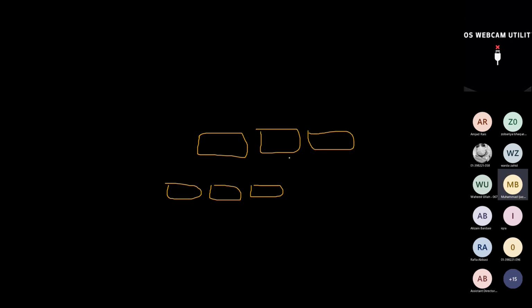Okay, so now multiple user stories combined together give us a feature, right? And then multiple features of similar nature combine together and give you an epic. Fine? Is it clear?